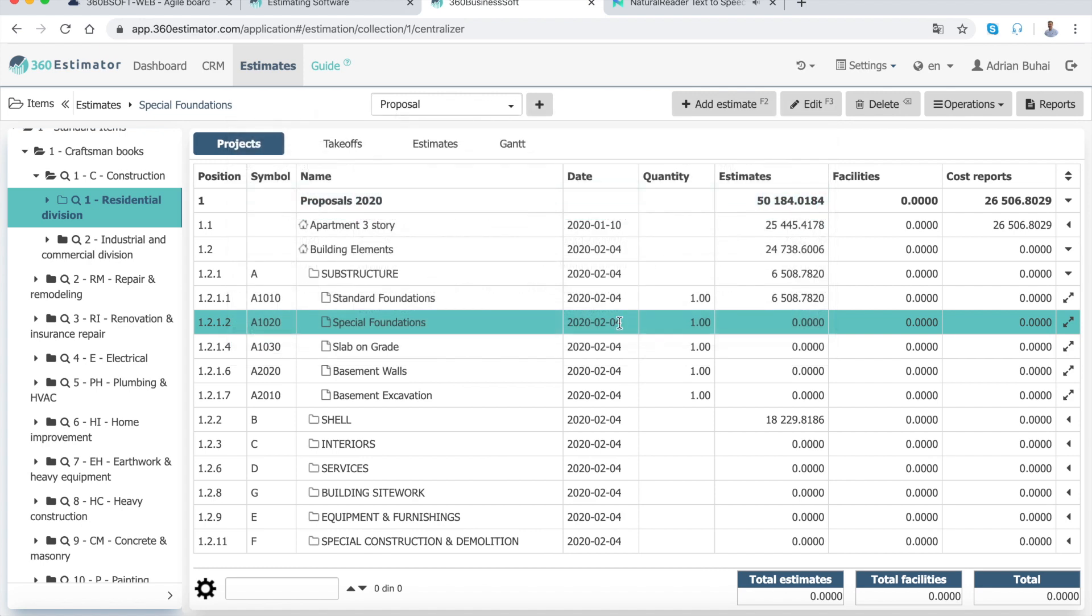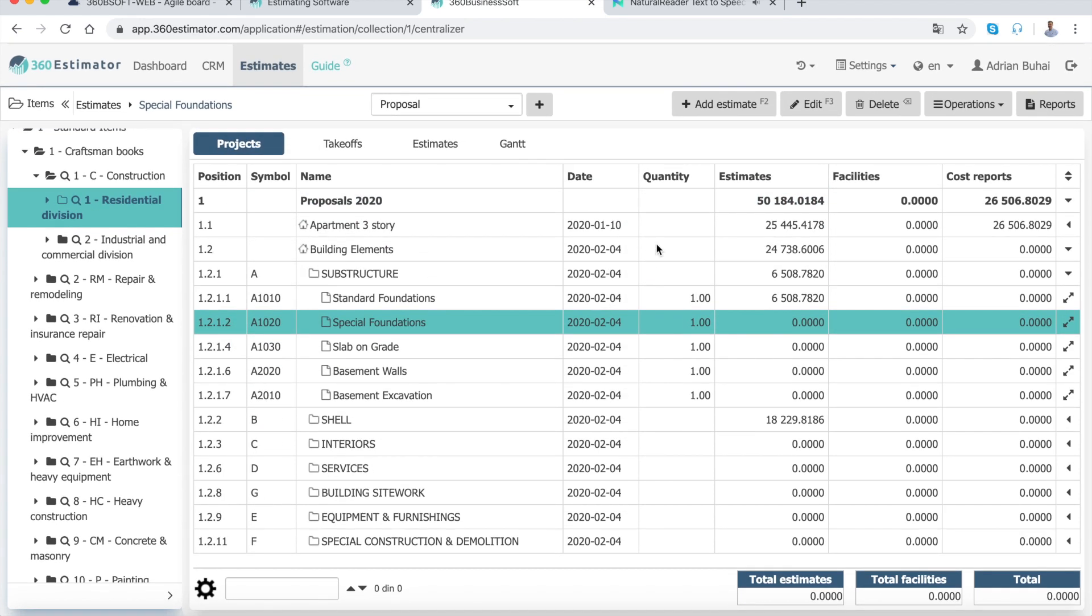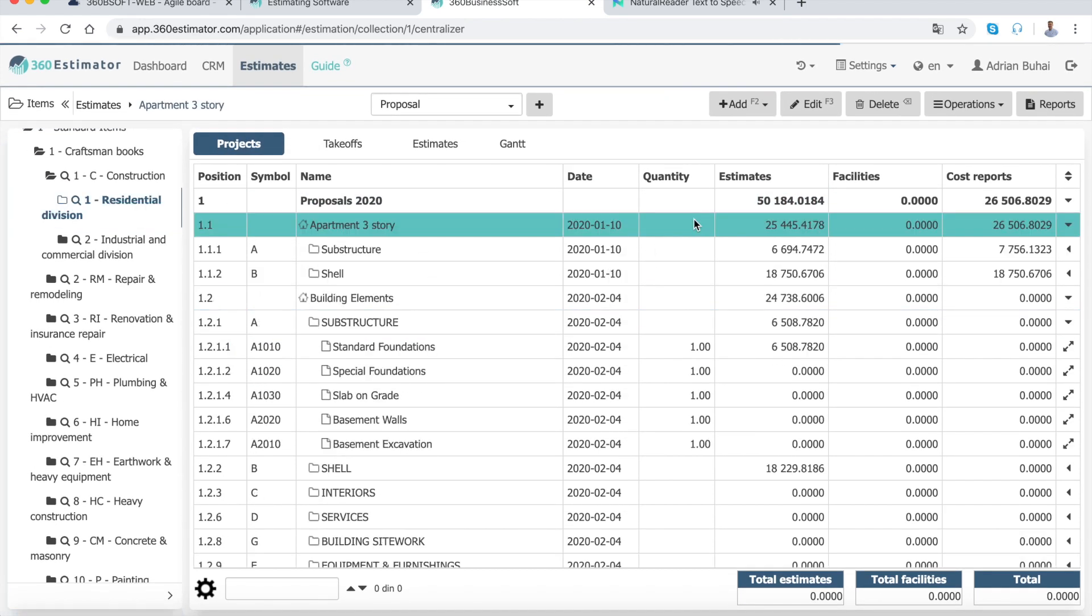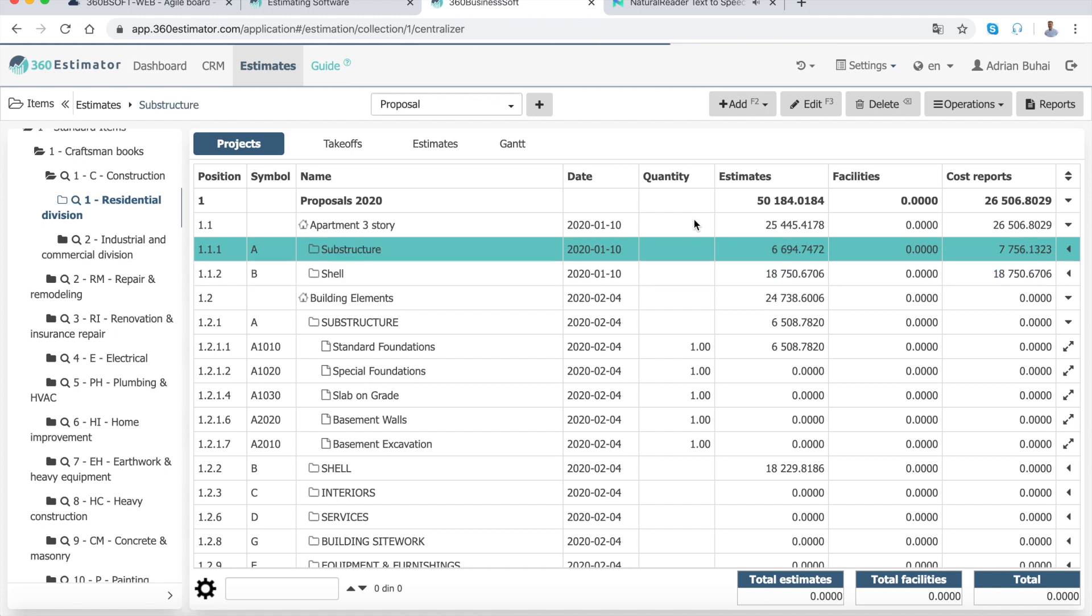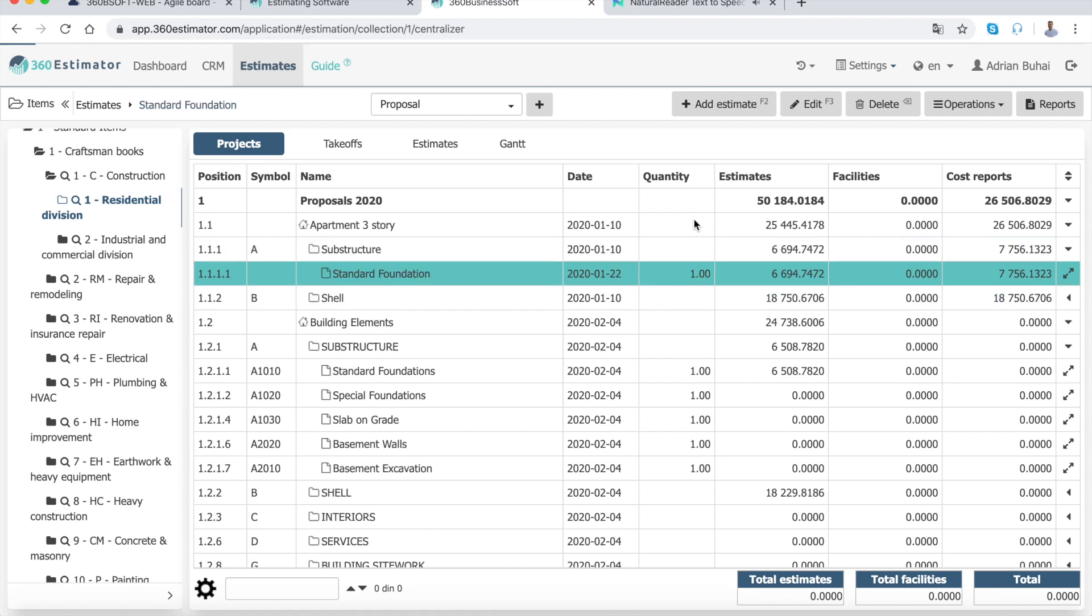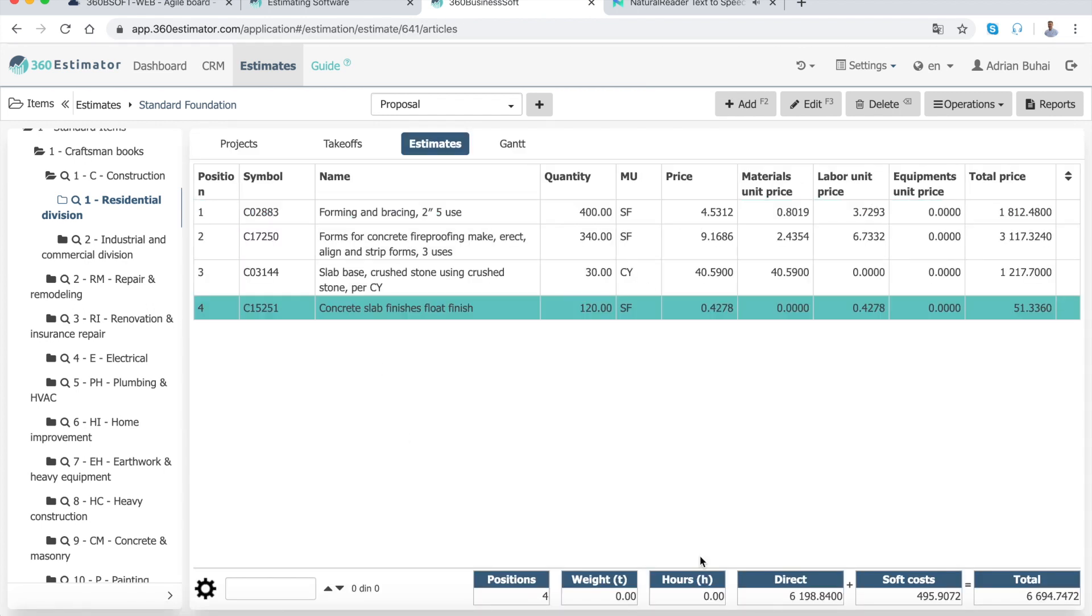Assemblies are useful for developing a budget estimate right from the design development stage of a design project. Estimates can be developed quickly since the assembly's format groups commonly used construction work tasks, simplifying the estimating process.